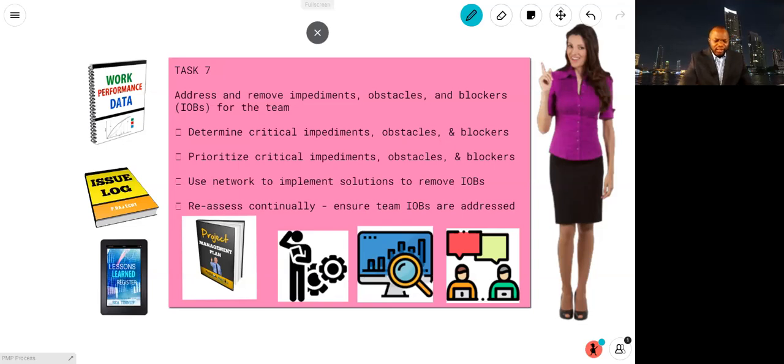Well, instead, in the world of Agile, we want to encourage being aggressive, going after that impediment like tomorrow depends on it, like now depends on it. And if someone's not getting you an answer, go get an answer. Find the answer, do whatever you need to do to remove the impediment. So impediment resolution comes first before jumping to something new. Only go work something new if necessary. But your first instinct is going to be yank that impediment out of the way. That's the whole idea. Get rid of those horrible impediments. And that's what we want to do. Go after the impediments aggressively.